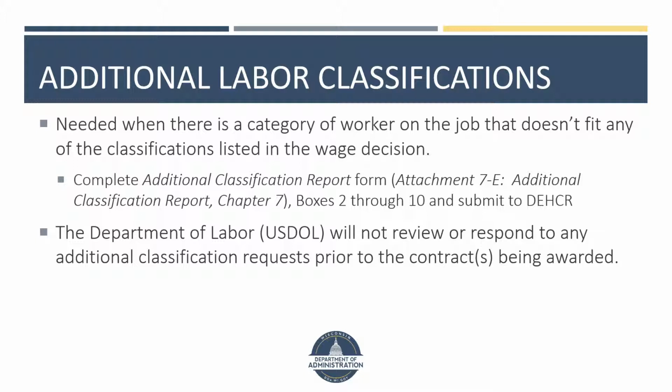First, the contractor must send a letter to the Labor Standards Officer informing them of the situation. It may be helpful for this letter to include pertinent information such as the worker's existing and proposed rate of pay and benefits, and if available, the same category of worker rate of pay and benefits for a nearby county if one exists.